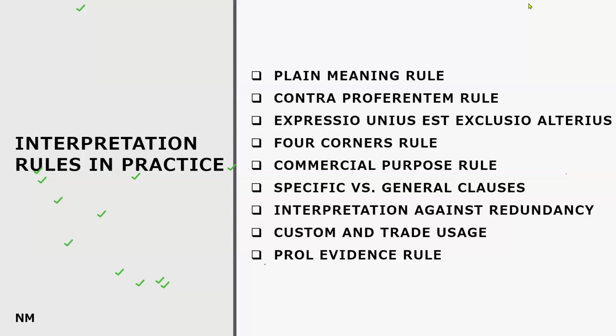It's not saying the contractor is not entitled to the profit, but it is silent. So from the contractor's perspective, he might claim the profit as well. He must take the position that it is not explicitly omitted, it is silent. But from the business perspective, if I'm spending my money, I should be able to get the profit as well. From that perspective, he will take it, right?